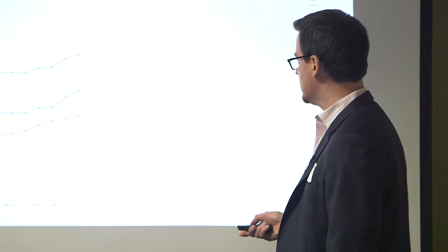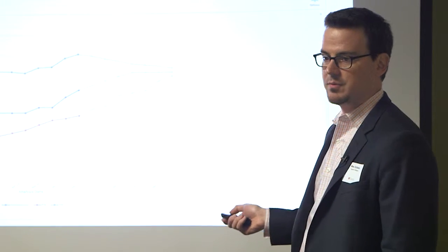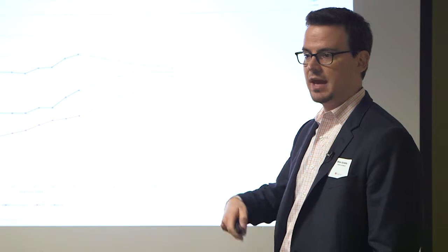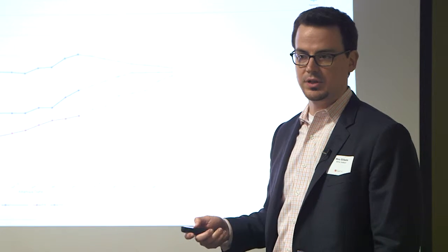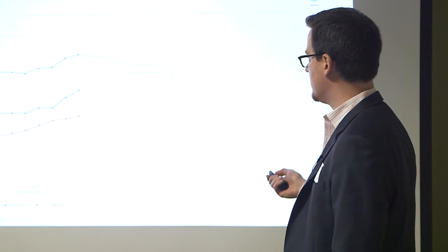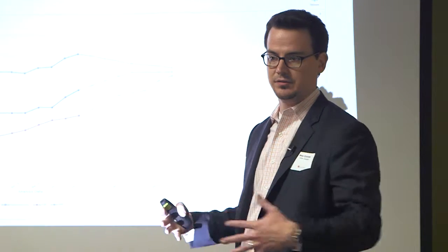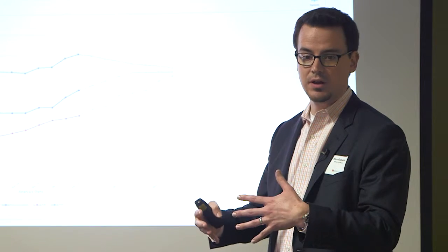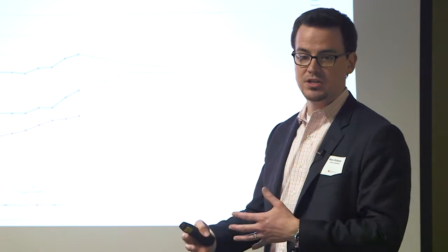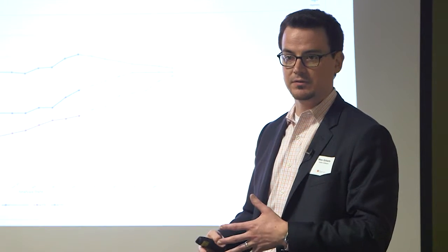What we want to see is something that does this over time as well, right? As I execute my project and I come closer towards completion, I hope to see convergence around those 3 points, right? As we remove the uncertainty from our analysis, the uncertainty from our project, we should be driving that out. It's a way we can validate, are we managing contingency, are we managing our project effectively, right?